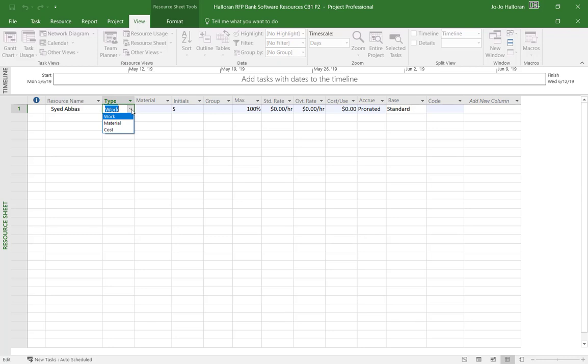That is never the same, because it depends on if you're traveling, say, from Miami to New York, it could be one price, but if you go from Miami to Los Angeles, it's usually more expensive, but you still consider that travel. So that is where you use it as a cost resource. And the same thing with food. If you're providing food for a conference, it may cost $100 one day, and the next time you order food, it could possibly be $150. So that's why travel and food are always considered a cost resource instead of a material resource.